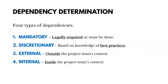There are four types of dependencies. Mandatory dependencies are legally required or inherent in the nature of the work. Discretionary dependencies are based on best practices — they're a good idea. External dependencies are outside the control of the project team, and internal dependencies are inside their control. A dependency can be one of the first two and also one of the last two — it doesn't have to be just one.